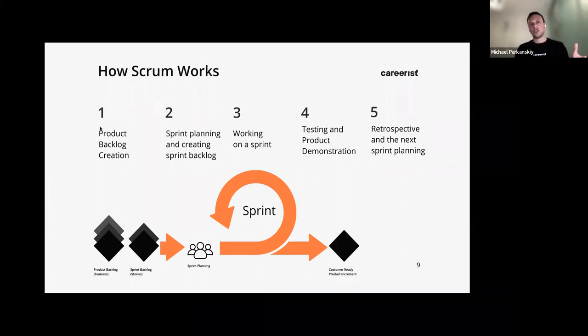One of the first columns could be the backlog column, sitting with a bunch of feature tickets and bug tickets waiting for their turn. And as soon as we have a sprint planning call conversation, we would grab one of these feature tickets and we would move it, let's say, to another column that says to do.